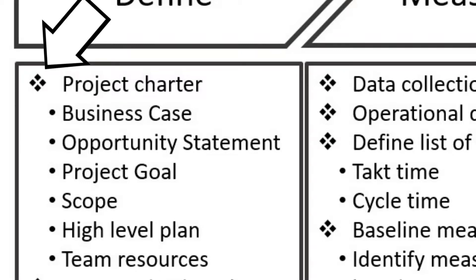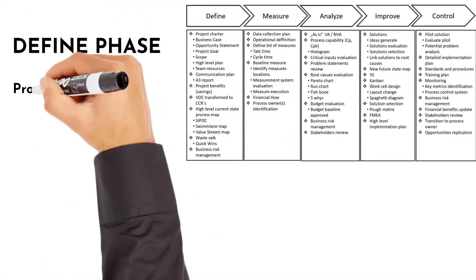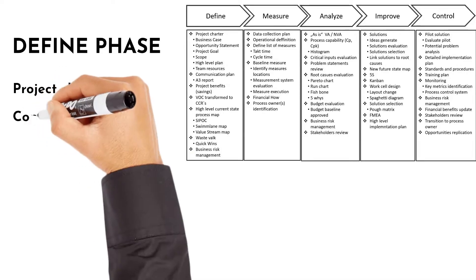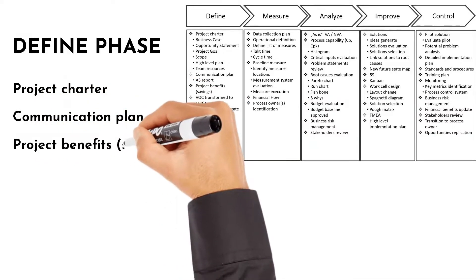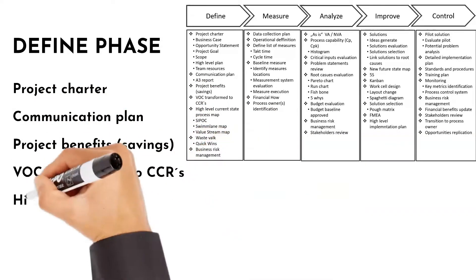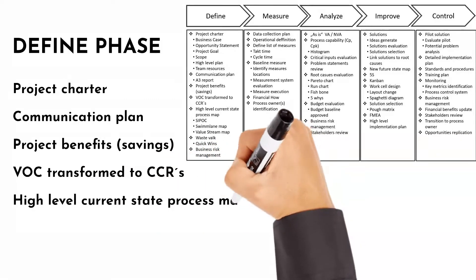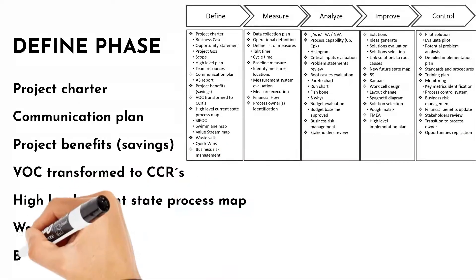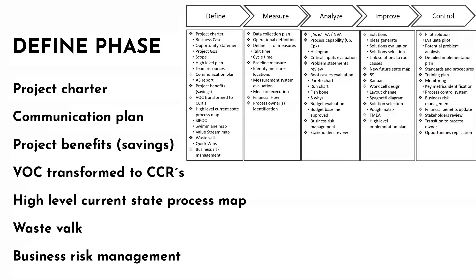For example, in the Define phase, the project charter is a main tool and its subtopics are: business case, opportunity statement, project goal, scope, high level plan and team resources. The other main tools in the Define phase are: communication plan, project benefits, voice of customer transformed to critical customer requirements, high level current state process map, waste walk and business risk management.